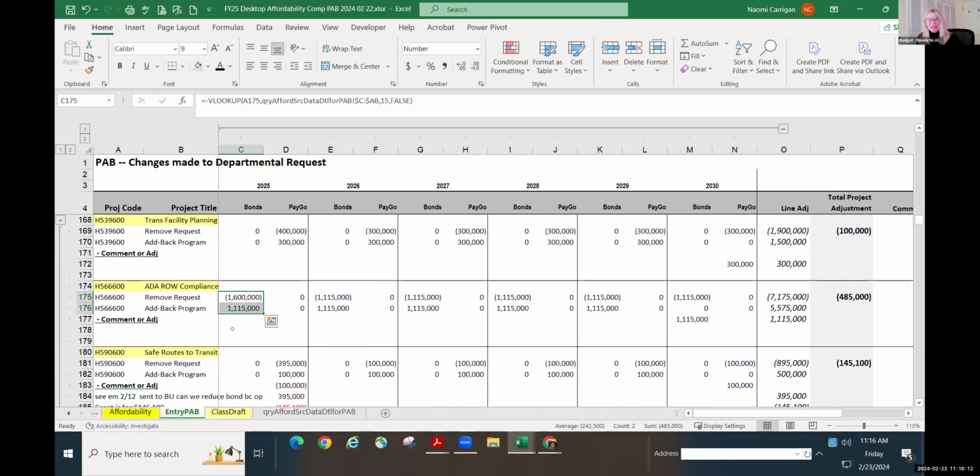It's like 485, so it sounds very specific in my mind, but it's basically a percentage related to the overall road reconstruction costs. So they applied that percentage increase to all of the projects that are associated with the road reconstruction, because all of these come into play. Doing the ADA ramps, doing the curb work and everything when they're doing the roads.